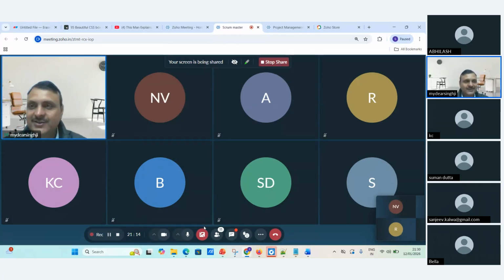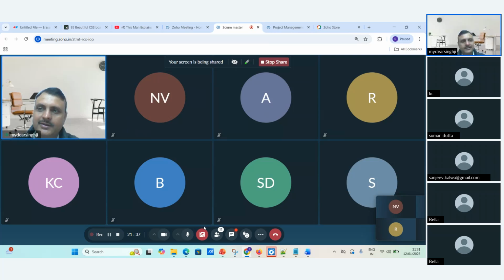Any other people? Just give one example of how we are using Agile in a non-IT department. I'll give you an example. Sales teams make a 2 week plan or 1 month plan. In these 2 weeks, these are the items we are going to sell. In this 1 month, this is the target for selling. So every 2 weeks or every month, they validate how much they sold, how much is pending, and where the bottleneck is. So this also comes under Agile.